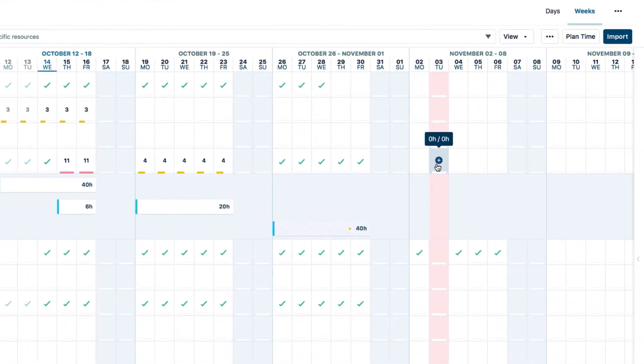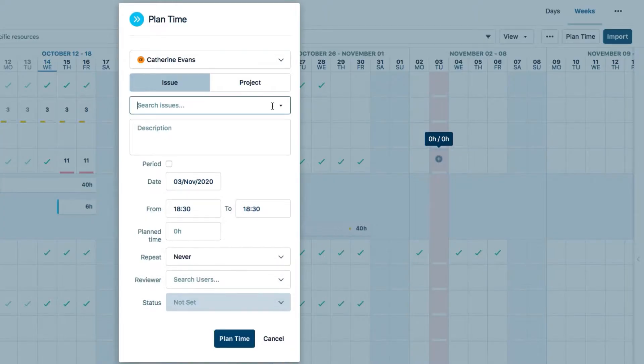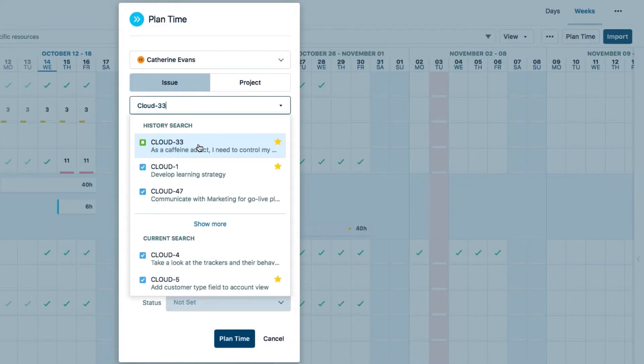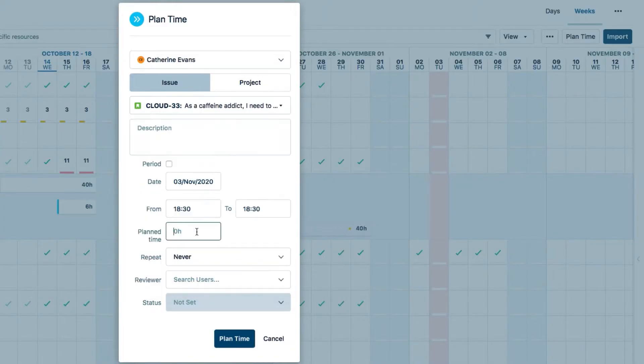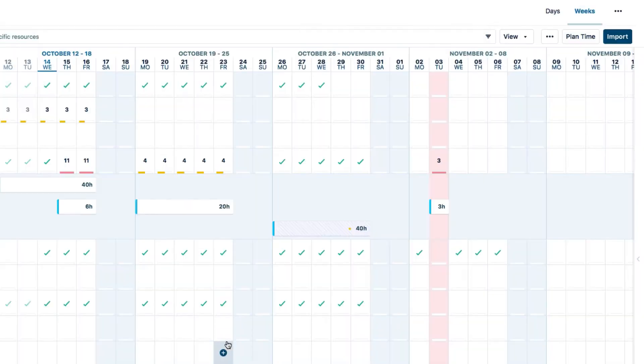This pink day is a holiday that is defined by the holiday scheme. As in timesheets, I'm allowed to plan time on a holiday, but it's not considered part of my working capacity.